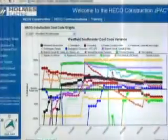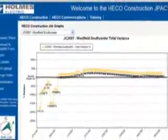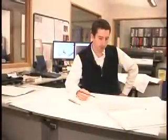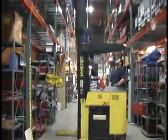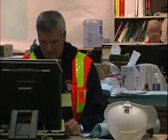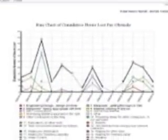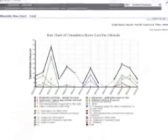JPAC, which stands for Job Productivity Assurance and Control, is a program that establishes the baseline of job productivity, with full consideration given to the original estimate and the way the project team defines the work breakdown structure. When reported and reviewed at regular intervals, JPAC forecasts productivity and identifies the trends that will negatively affect the project goals. SIS, which stands for Short Interval Scheduling, is a program that validates JPAC productivity by identifying the root cause of interruptions to workflow and production.